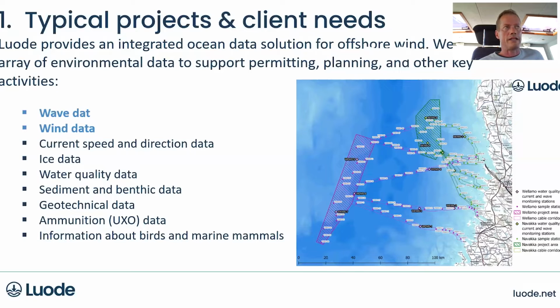And one of the specialties in the Baltic Sea is that in certain locations we have annual sea ice present 6 months per year, which means that the service visits are very complicated tasks to be conducted during the winter period, meaning that there's a high emphasis to have all the servicing and all the maintenance done before the ice is coming and the sea is freezing. So therefore, not only the designing department or the technical department, but as well the maintenance people are already thinking about how often we can go there and what kind of conditions we are facing.